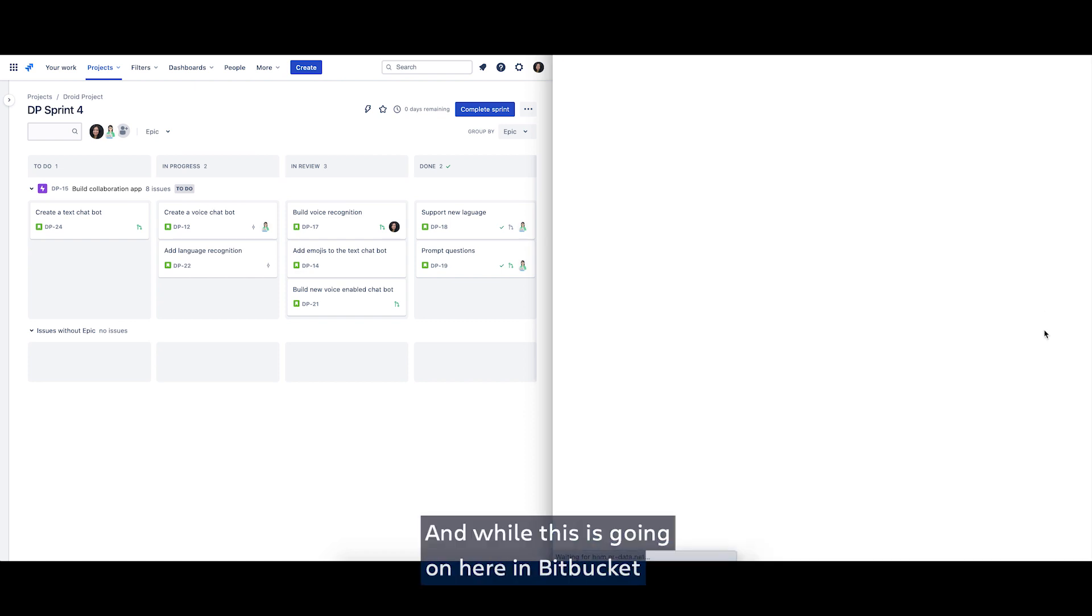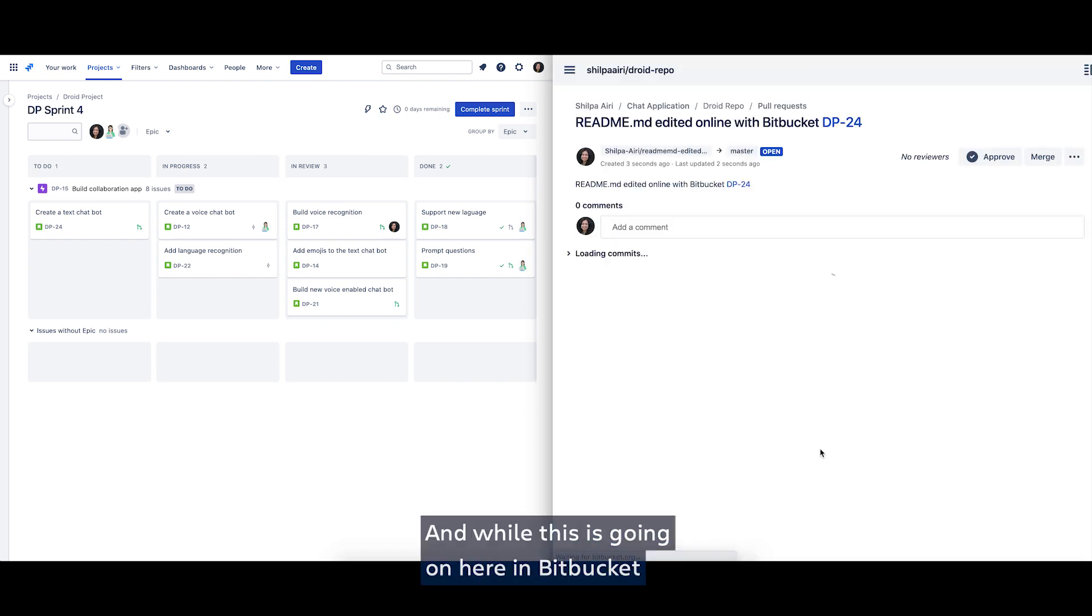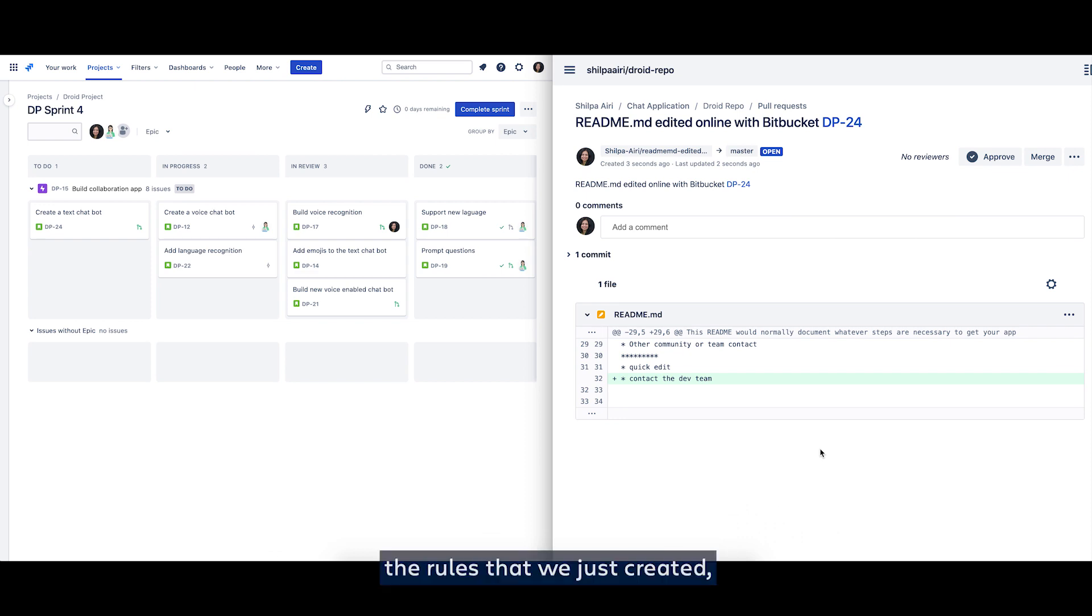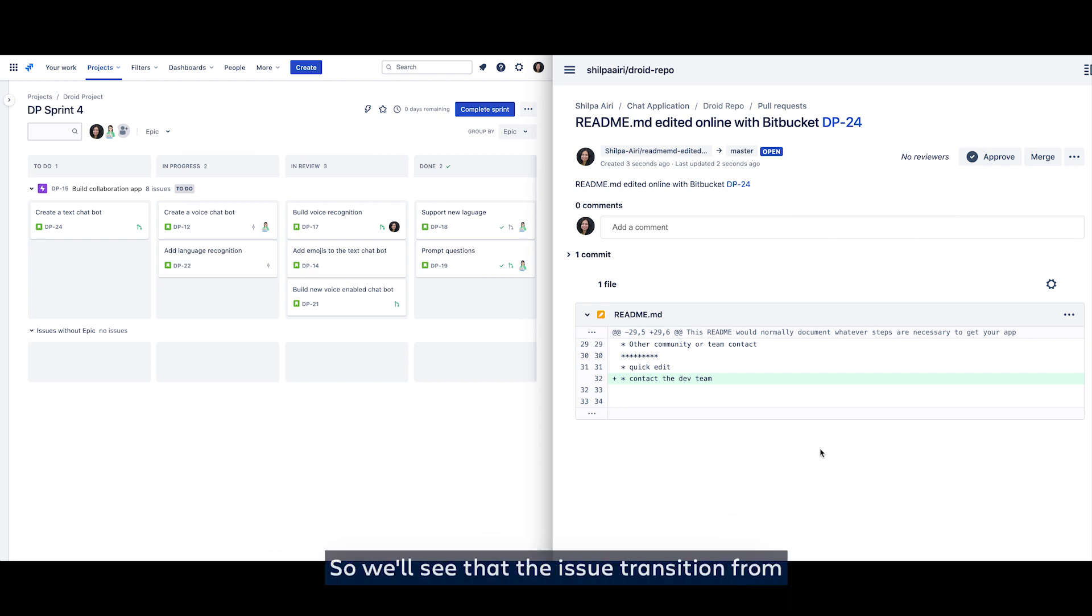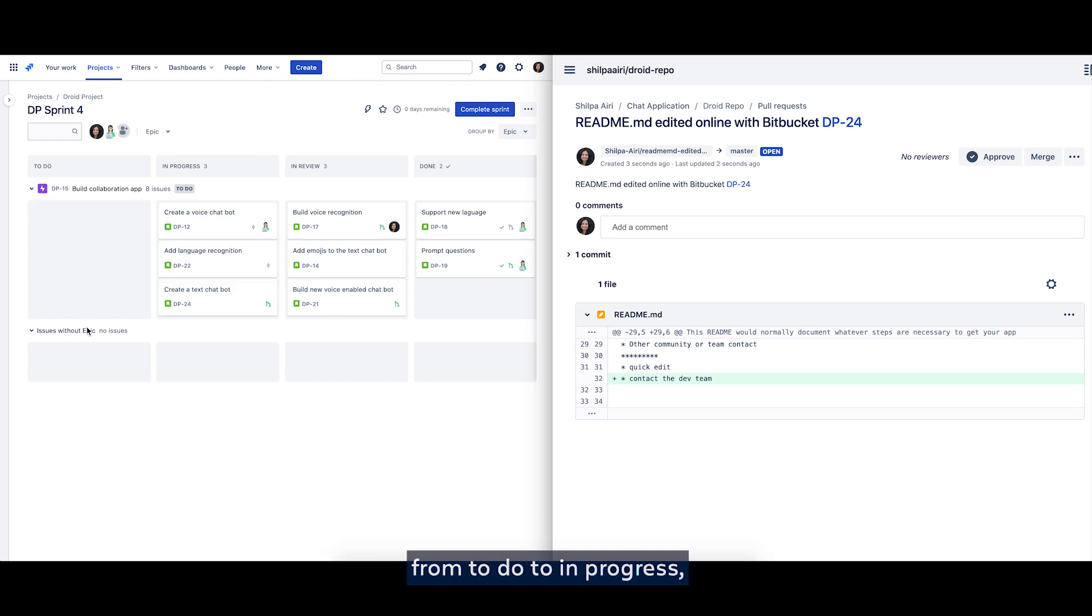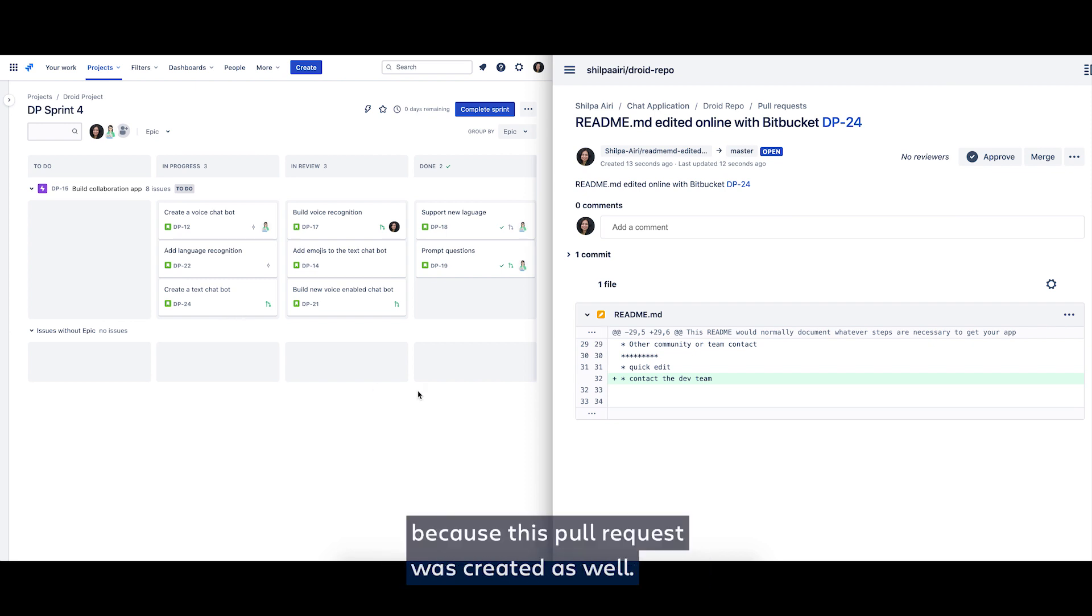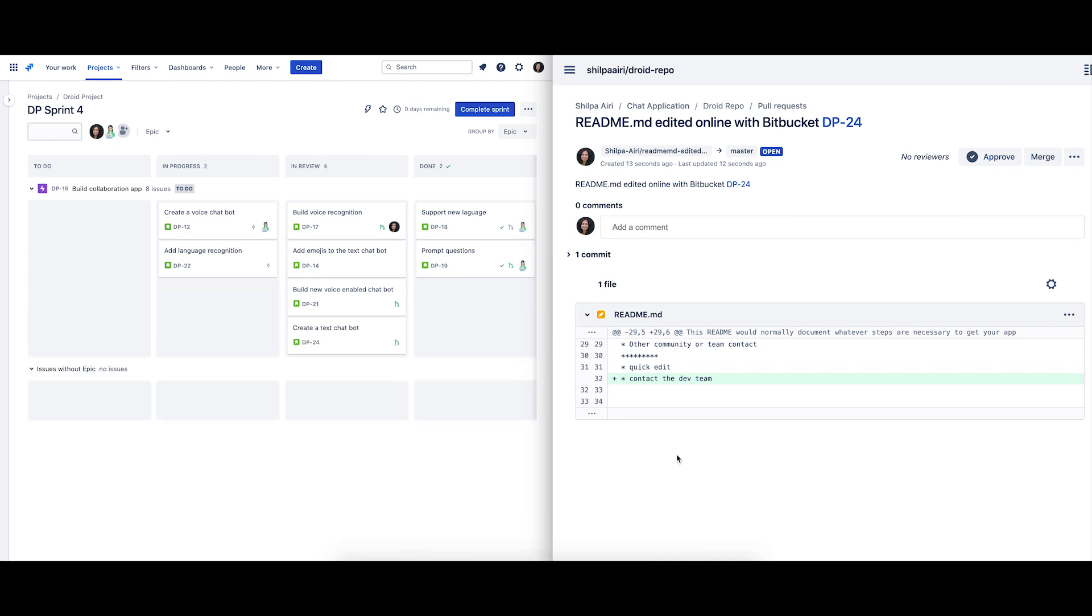And while this is going on here in Bitbucket, in the background the rules that we just created have started kicking in. So we'll see that the issue transitions from to do to in progress, and soon the issue should transition from in progress to in review because this pull request was created as well.